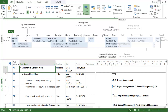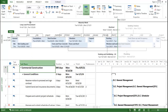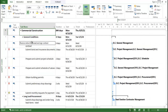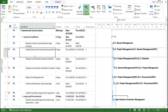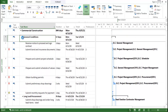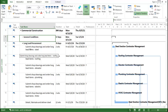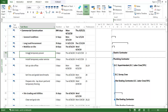Tasks refer to the activities you are going to carry out for your project. In this commercial construction project you can see that general conditions come first — before mobilization we need to review the notice, submit the bond, prepare and submit the project schedule, obtain the billing permit, and complete shop drawings. After that we go to long-lead procurement: submitting shop drawings for the elevator, electrical, HVAC, and more.